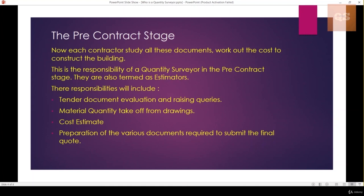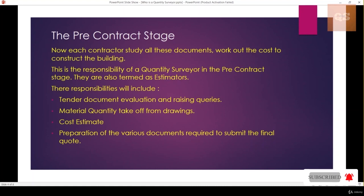Then you start your material quantity takeoffs from the drawings. You will take off the total materials required for each aspect — how many doors are required, how many ACs, how many light points, what is the quantity of steel, concrete, sand, cement, paint, and flooring. After that, you do your rate analysis, apply your rates for carrying out each work, and produce a cost estimate for the complete building.